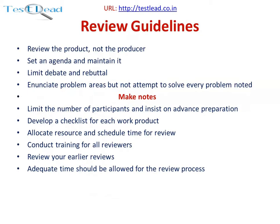Review guidelines include: review the product, not the producer; set an agenda and maintain it; limit debate and rebuttal; communicate problem areas but do not attempt to solve every problem noted; limit the number of participants and insist on advance preparation; develop a checklist for each work product; allocate resources and schedule time for review; conduct training for all reviewers; review earlier reviews; and allow adequate time for the review process.